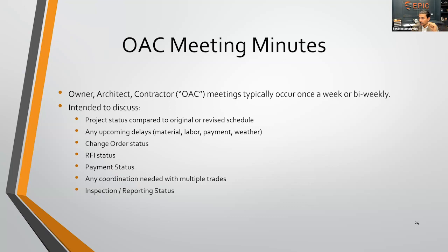One other thing I did want to go ahead and make mention on here regarding delays. Oh, here we go. This is something that I've been seeing as far as contracts are concerned as of late, and really a lot of it's stemming from 2020 and moving on. The contractor's contract will only absorb a certain percentage of material pricing increase. So usually anywhere from 1% to 5%.